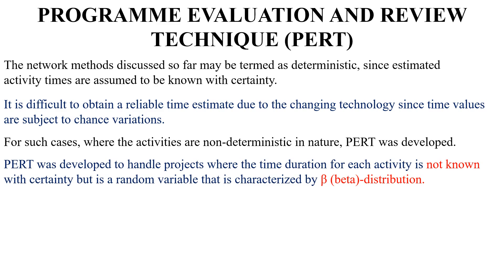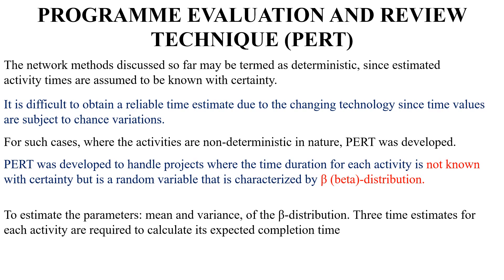PERT was developed to handle projects where the time duration for each activity is not known with certainty, but is a random variable characterized by a beta distribution. To estimate parameters such as mean and variance of the beta distribution, three time estimates for each activity are required to calculate its expected completion time.